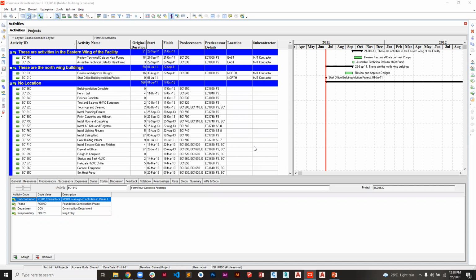Then from constraints, we've looked at the activity codes, and the activity codes help you to arrange or to make reports according to what you prefer in your organization. So you can say we prefer by location, we prefer by subcontractor, we prefer by anything. Create that particular activity code, then assign activities to those codes, then use filter by or group and sort by to organize the activities according to your activity codes. So Mr. Kevin, I think now you can see the difference: WBS is totally different. They all help you in organizing, but they are considering different things.